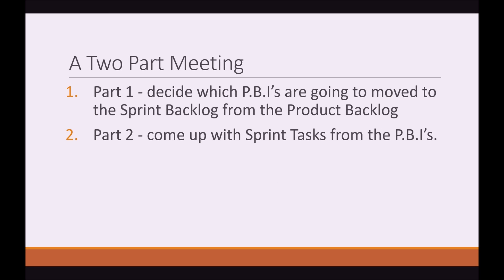The Sprint Planning Meeting is known as a 2-part meeting. In Part 1, we decide which PBIs — Product Backlog Items — are going to be moved to the Sprint Backlog from the Product Backlog. In Part 2, we are going to come up with Sprint Tasks from the PBIs that we have moved into the Sprint Backlog.